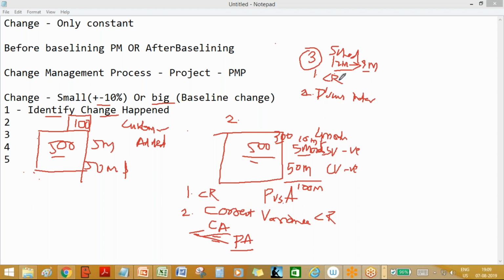Third, as I said, now the customer has asked you to prepone the delivery, and now you have raised a change request. Whatever the protocol is, you put it in. Remember, whenever a change request is clearly identified, it has to be documented. It cannot be verbal. Even if he has shaken your hand, whether he is a 50-year-old vendor or customer, you cannot take any change on verbal.